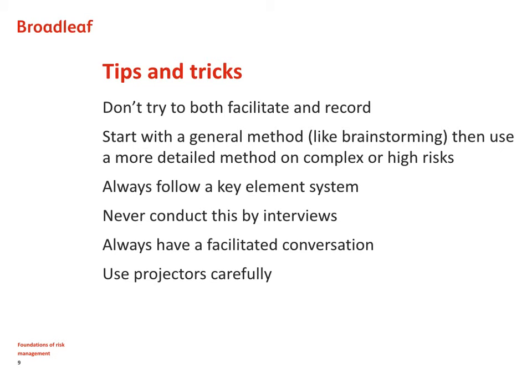Some of us like to use projectors to project what is being recorded at that moment in time. But you have to be very careful. Unless you know exactly what you're doing, the projected text will slow down the brainstorming and you'll end up with people wordsmithing what is written there rather than exercising their imagination about risks. They will be drawn to the screen and will spend all their time arguing over the words rather than expressing their views on the risks. So we must be very careful the way we use projectors.